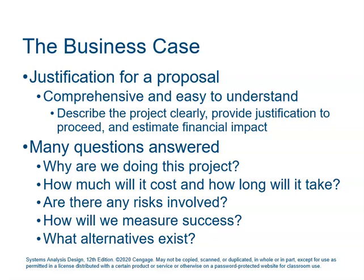We also really need to look at estimating financial impact. A lot of times the financial cost is really your go/no-go for certain projects. You want to look not only at how much it's going to cost, but what is the benefit — what's your ROI? What am I going to get out of it? I might have to shell out $100,000 now, but am I going to see a savings of $10,000, $20,000, or $30,000 a year moving forward?